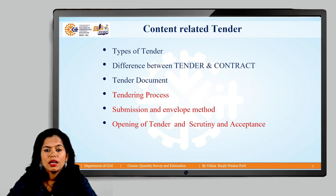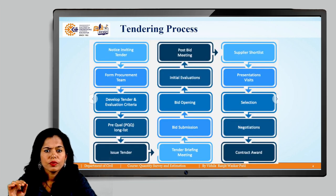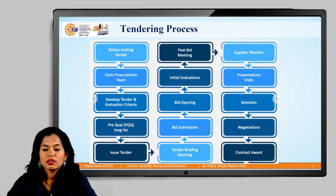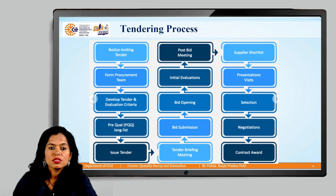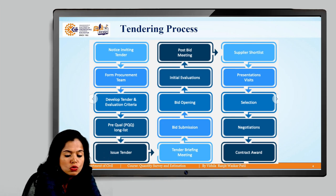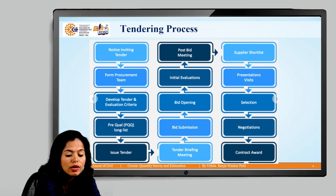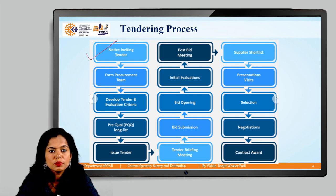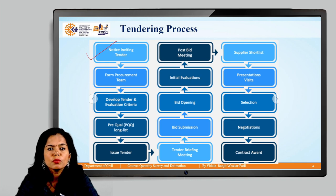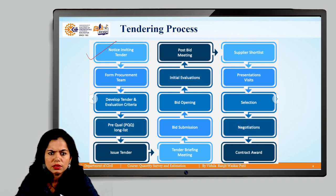This is the flowchart of the tendering process. The proposal is submitted in the form of a notice, either as a detailed tender notice or a notice published in the newspaper. The first step in this process is inviting a tender notice for the particular project after sanctioning. The procurement team of the particular department is then formed.